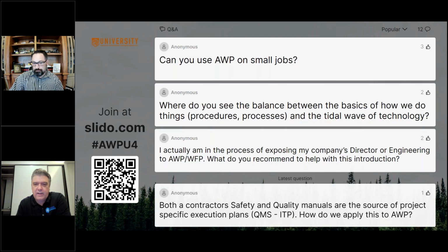And you're applying then the principles of AWP at a programmatic level, considering operational dynamics of, can I have packages ready, so that if there's some downtime that was unexpected, I can get in there and get the work done. Queuing them up.